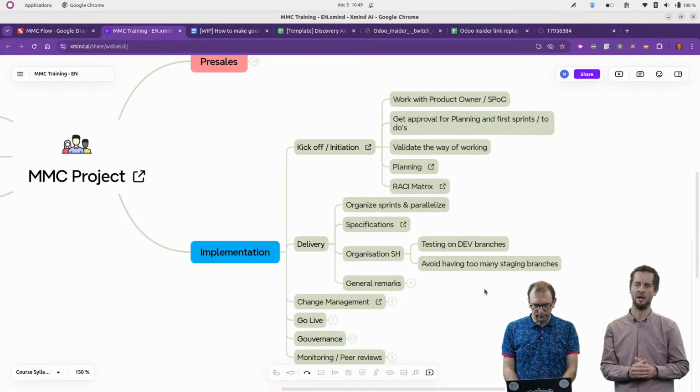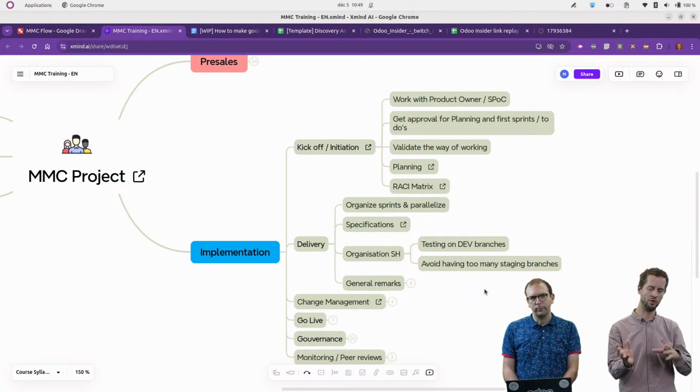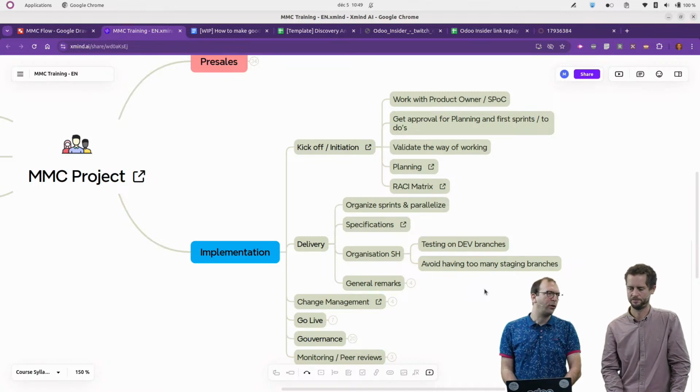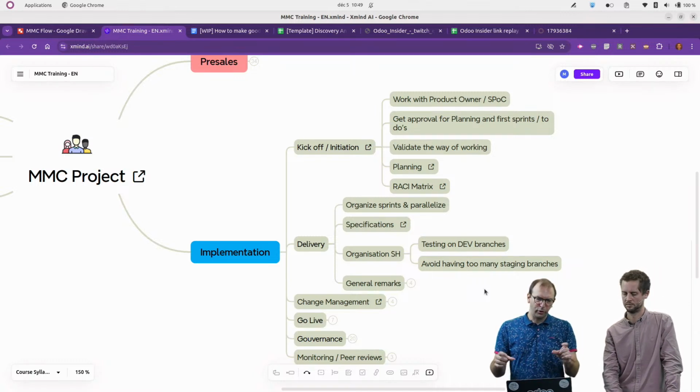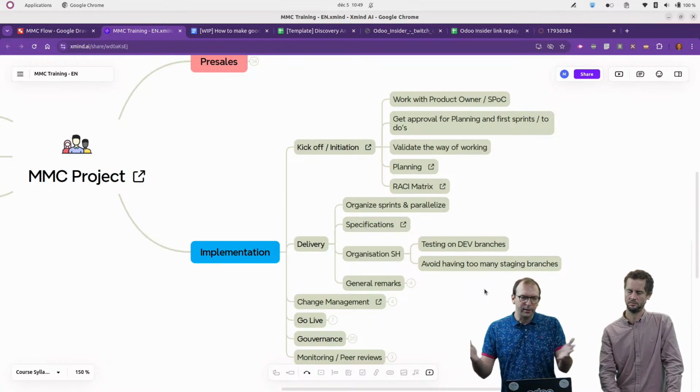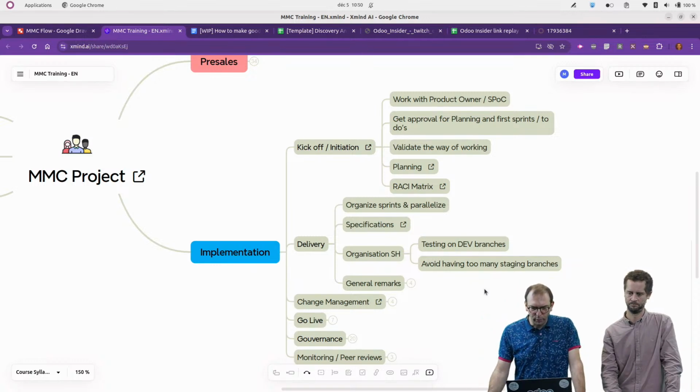One big specification, so we explain it once, and then he can work for several days, and then the BA can also focus on the next block of specification. Yes, and not only that, if you cut the developments into small pieces, later on you have to make sure that all those pieces fit well together, while if you put all the pieces in one specification, it's by design that the fit will be there.